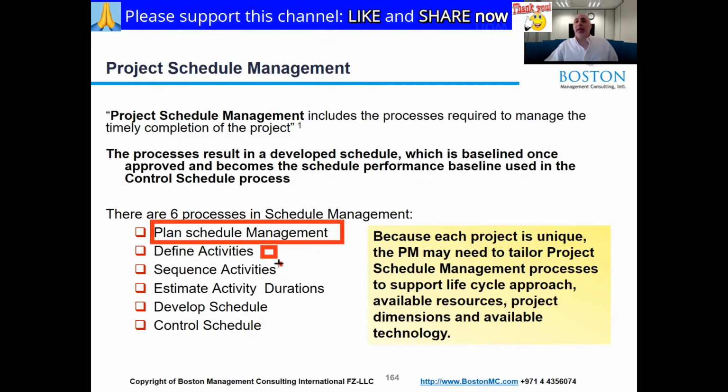And then once you identify the activities, you can connect them in the right order, which one has to happen first, which one is next. And even when you have activities coming, my hands are like WBS packages, right? And the fingers are the activities. Sometimes you'll find that one finger here is going to connect, or maybe needs to finish before another activity on a different WBS needs to happen.